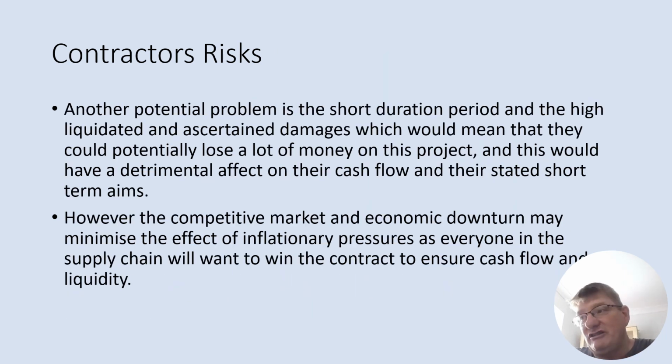Another potential risk is the short duration period and the high liquidity. It is very much more difficult for a smaller company to bear those risks than for larger companies, even though one of the mitigating factors, as we said earlier, is that you are used to work like this. It's very familiar work. So 16 weeks might not be a problem for you. But if suddenly you do find a problem and you start to go overtime, £85,000 over 3 or 4 weeks could actually bankrupt you. I know it doesn't seem a lot, but it could end up bankrupting you. So it's quite a high risk there, all right?